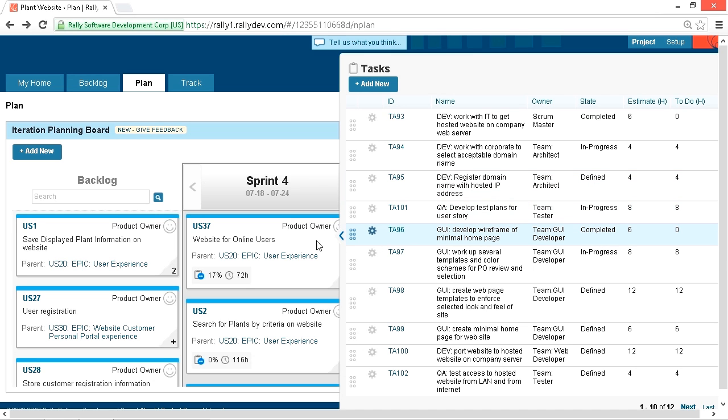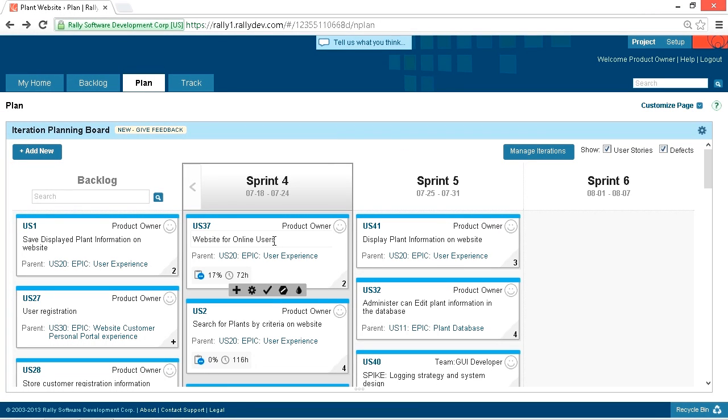As the sprint progresses, the PBIs in the sprint backlog are moved from defined to in progress as the tasks start to get worked to completed. Now, when the product owner decides a completed PBI's acceptance criteria is met, the PBI is considered done and can be included as work done in the sprint review meeting. The team's work during the sprint results in a product increment containing the functionality in the PBIs completed in the sprint backlog.